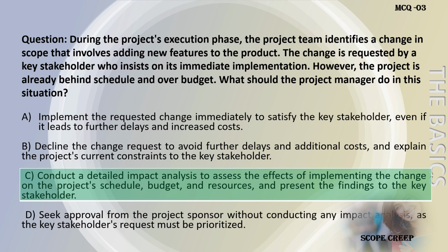Explanation. In this situation, the most appropriate action for the project manager is to conduct a detailed impact analysis to assess how implementing the requested change will affect the project's schedule, budget, and resources. This analysis will provide a clear understanding of the potential consequences of accommodating the change. The findings of the impact analysis should be presented to the key stakeholder to have an informed discussion about the implications of proceeding with the change request.